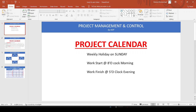Now I'll use some slides to show you the possible causes for this problem. One of the causes that may create this issue is the project calendar. We have to check the calendar — what are the holidays, the non-working days, and the timing of the project. The timing is most important: what time work starts, what time it finishes.